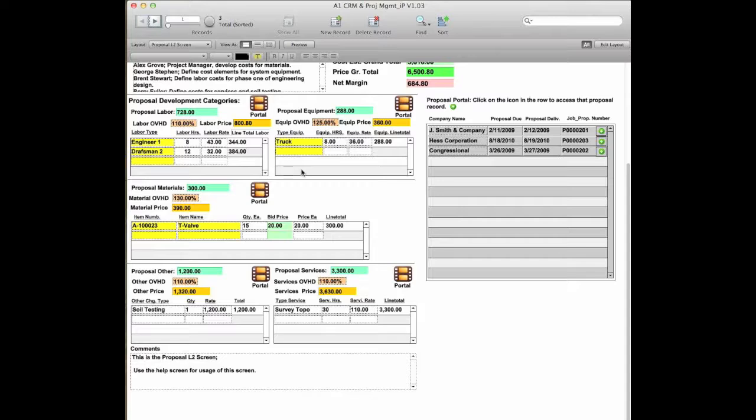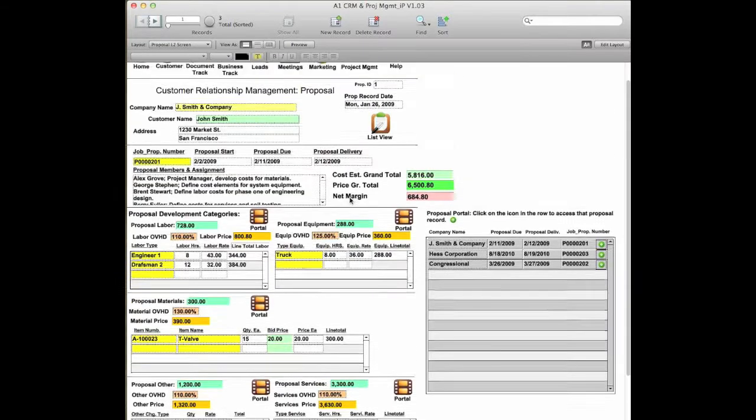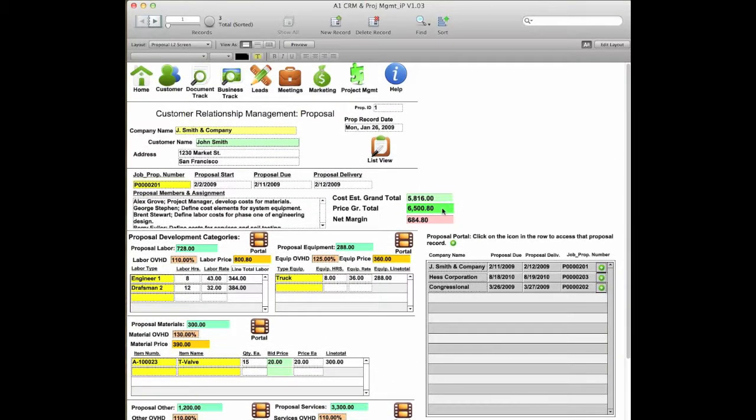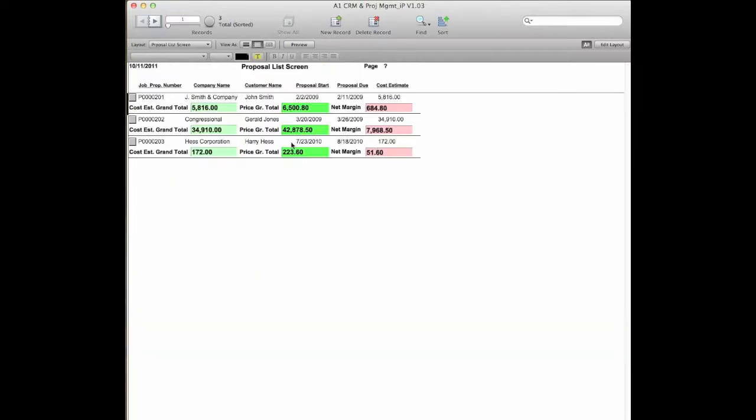Now consider that this is the marketing budget, not the actual operations or project budget. That's very important to recognize. So whatever the margin is here, that will not be passed over to the operations group as far as the project is concerned. They would be working with the unmargined price, which is the estimate of all the dollars minus the overhead and profit. Once again, there's another list in here that actually shows the actual projects and the information as far as margin and budget.